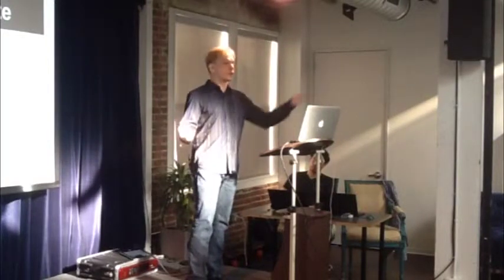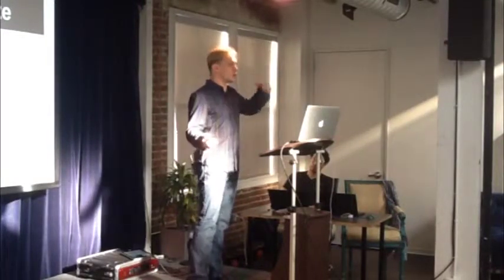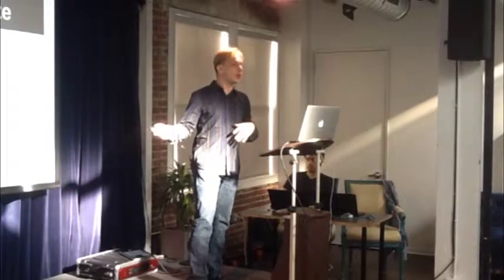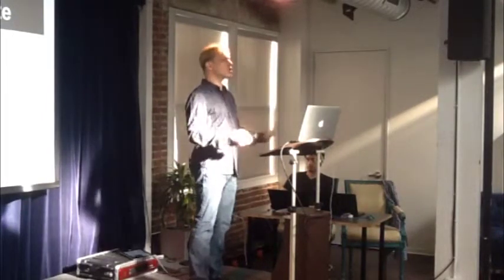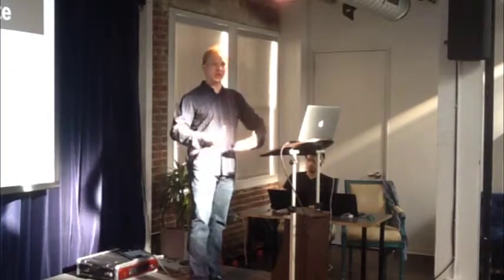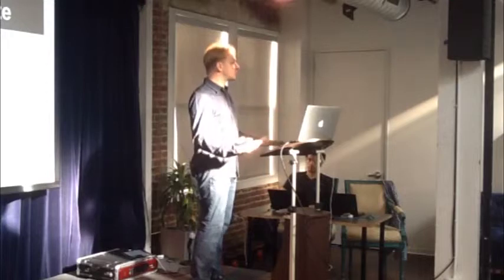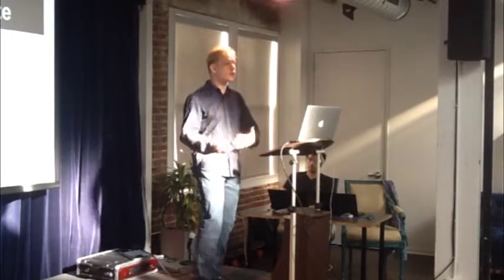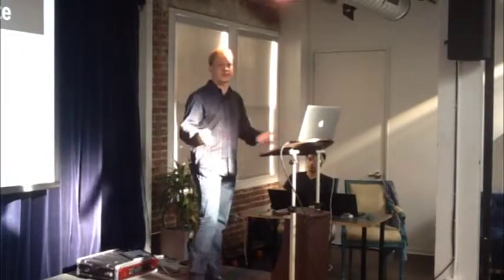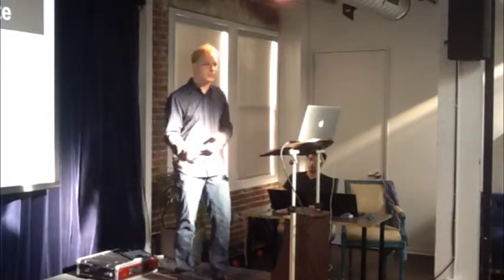That estimate, based on all the things I've already said about the psychological effects, has a very good likelihood of already being optimistic. When you negotiate on that estimate and say, "Hey, I'd really like to get this done cheaper," if you push, the developer wants to make you happy, and they're probably going to say okay. They'll rationalize, maybe there's a way I can get this done a little faster, and they'll bring that estimate down a little bit.